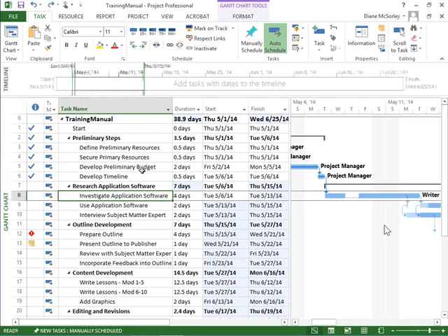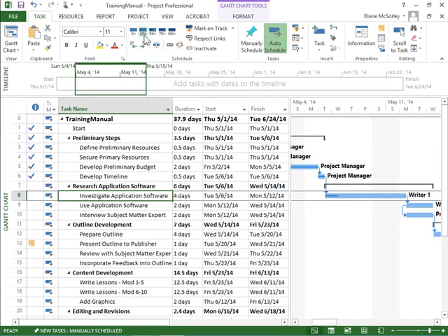And this second method gives us better control. So let's say in this situation, the task was being worked on and it was about 25% complete. So I use the 25% button. You can see it's 25% complete. And then there was a delay. And the remainder of the task has to all be pushed back a few days, not just one like the split, a few days.